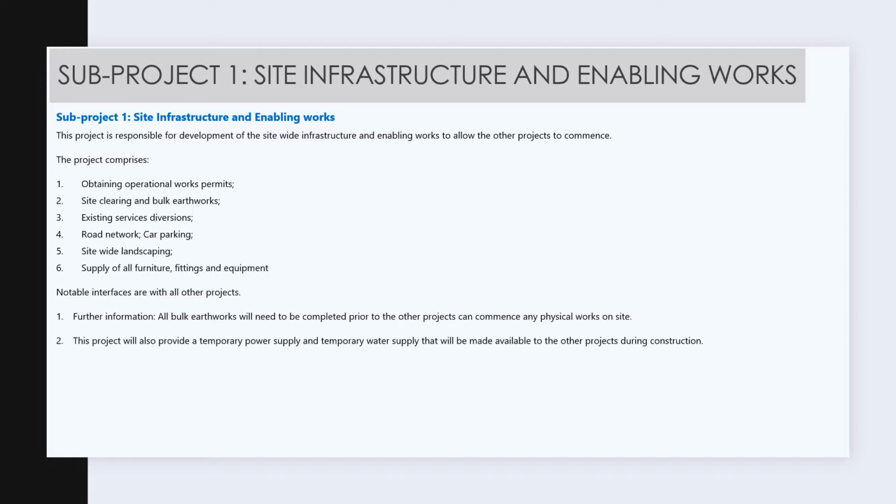We'll need a site survey that's comprehensive to establish the civil works challenges involved in the site clearing and bulk earthworks. We'll need to ensure tree clearing and making up the landscaping will be ecologically neutral, and we need to add probably clearing of the site to the scope. Considering whether the trees are able to be used for furniture, landscaping and wood chipping, also to reuse any of the topsoil that we remove as part of our land clearing.